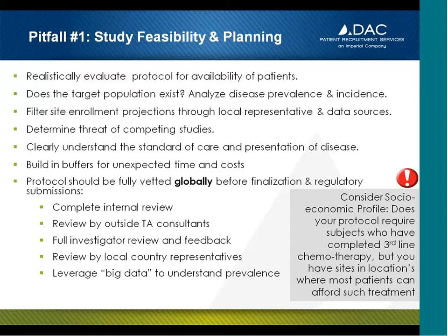And last but not least, when it comes to the protocol, I think we've all probably sat in on investigator meetings where the first site initiation visit is 2 weeks off, yet you're sitting in the meeting and the investigators are tearing apart the protocol, and there end up being amendments and changes, and you're already facing delays before you've really even gotten your study started. So we would recommend a very thorough vetting process of the protocol before you move forward with your program, and we bulleted out here some of the different parties that we would suggest you get involved during that review process to make sure that as best as possible that protocol is really finalized before moving forward with your study.